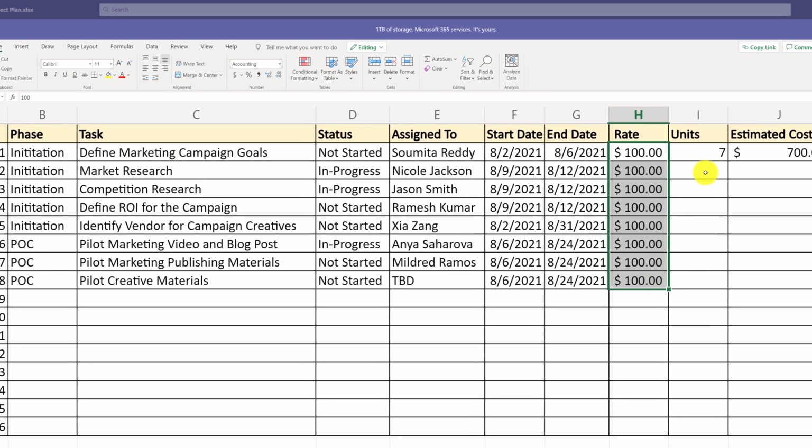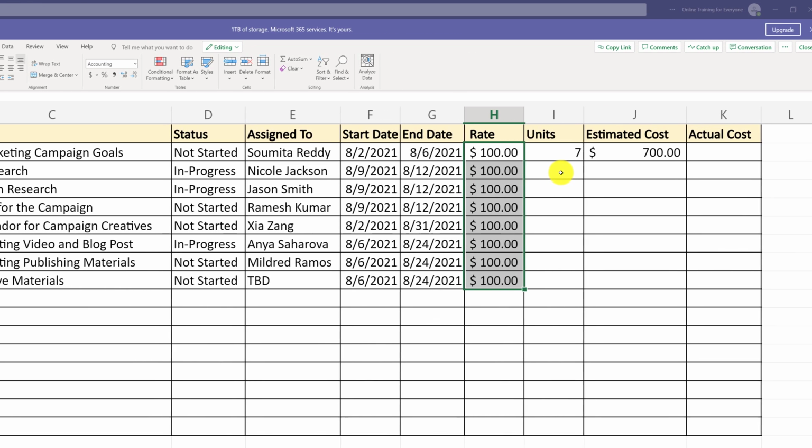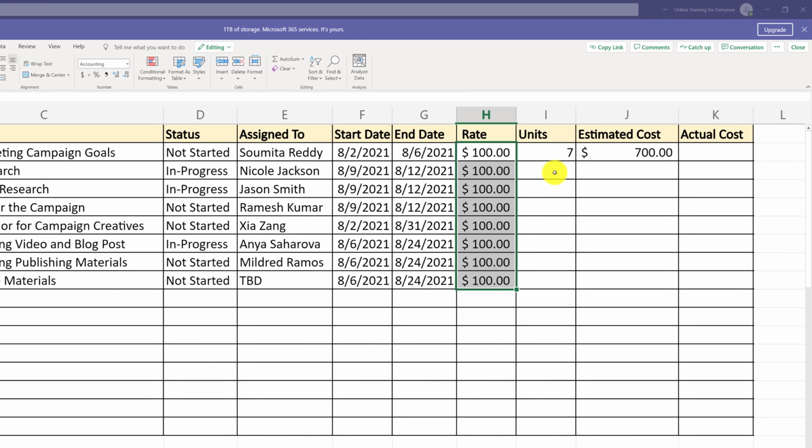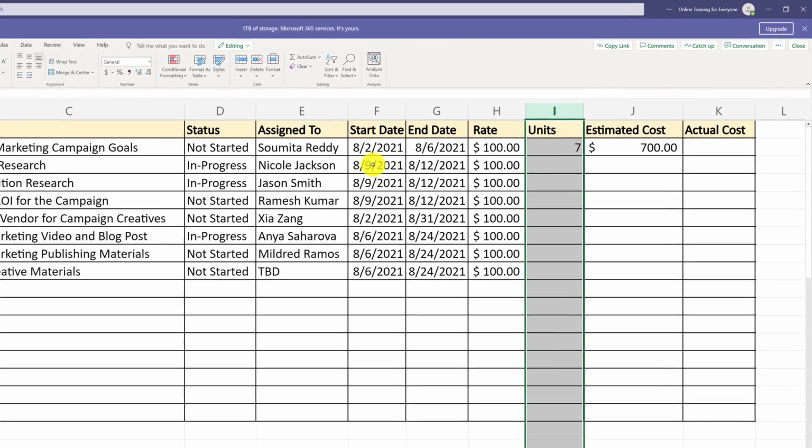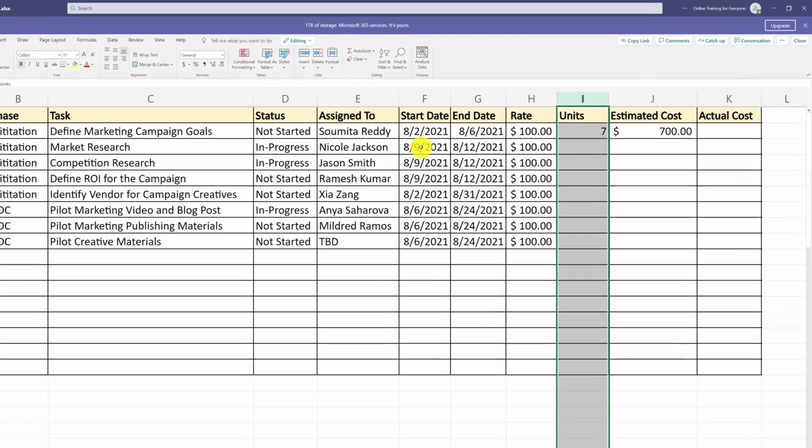The mastery of the experienced project manager typically comes in with the experience to estimate the tasks. Here in the column I, we might want to put the estimate of how much time this particular task will actually take to complete. There are different rules and different ideas how this could be estimated. For contractors, typically you would want to put actual hours, basically the effort for the work. But for employees, a lot of times project managers just put the hours in between the dates.